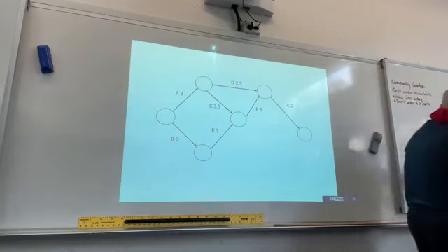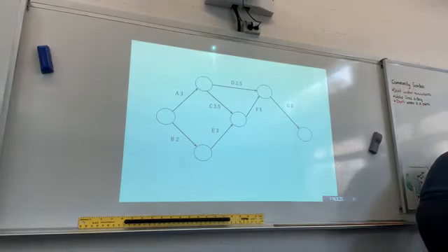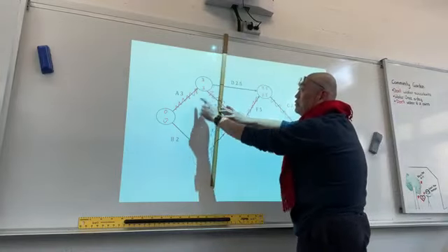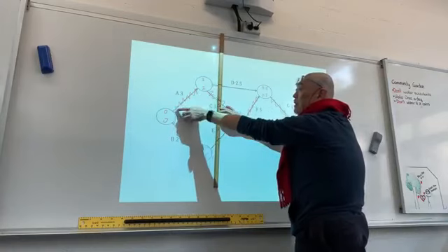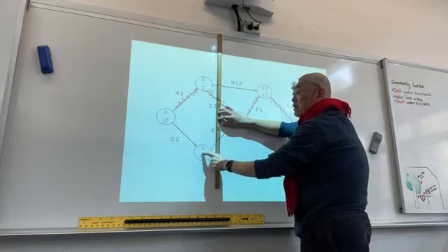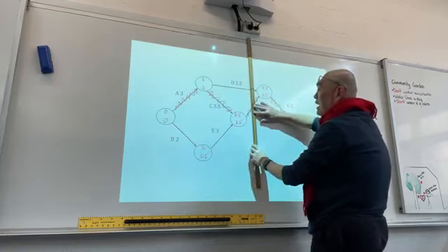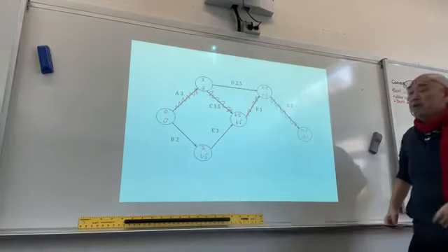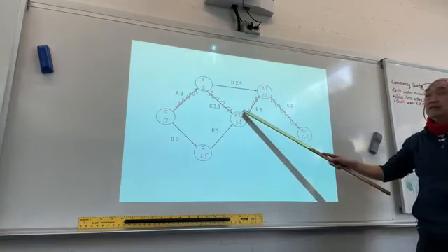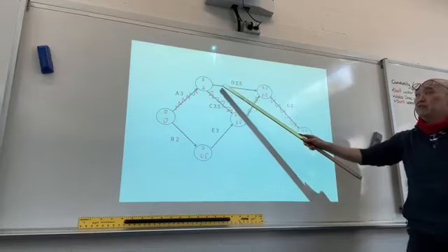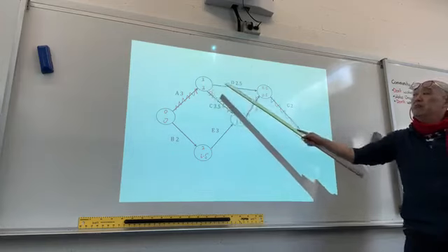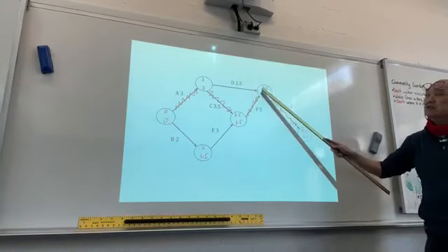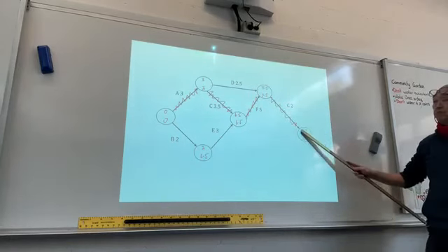The way I did it was, I start off with this bit, looking at A3 and B2. So I know A completes in 3 hours or 3 days, so it's up there 3, and B 2 days or 2 hours, B2. Now then I come to this node here. 3 plus 3.5 is 6.5, 2 plus 3 is 5. So you pick the higher one, which is 6.5. That's the earliest start time for that activity. For the last node, you can see that 3 plus 2.5 is 5.5, whereas 6.5 plus 5 is 11.5. 11.5 hours or 11.5 days. So you've got to pick the highest one, and then add together will give you your minimum completion time.